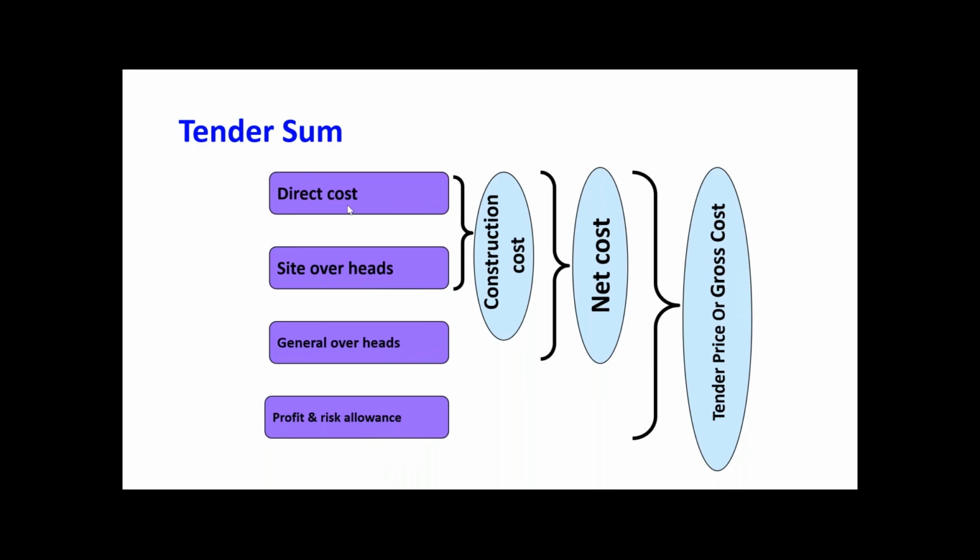Say for example, your total cost was 100 million. Now 70 million you spend for the direct cost. So how many million went for site office, general overhead and the profit? 30. So what is the percentage that you got here? 30, right? Likewise, if you take two or three projects, you can have that calculation. How much the total cost? How much the direct cost? So how much percentage went for profit and overhead? That calculation you can do.